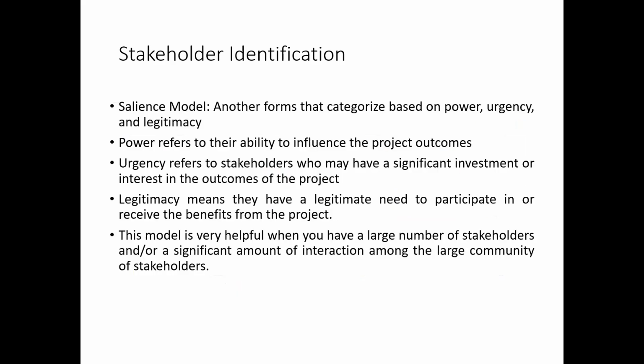And then we have the salience model, another form that categorizes stakeholders based on power, urgency, and legitimacy. Power refers to their ability to influence the project outcomes. Urgency refers to stakeholders who may have a significant investment or interest. And legitimacy means that they have a legitimate need to participate in or receive the benefit from the project. So this model is very helpful when you have a large number of stakeholders.